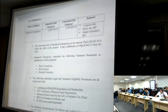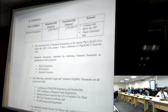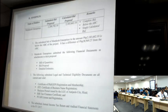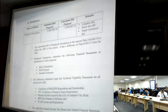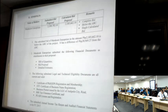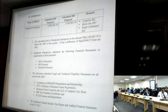During the opening of financial proposal, the bid offer of Marames Enterprises is 2,200,782.10, and this was reduced during the bid evaluation to 2,185,662.10. It was considered as a complete bid. It is below the ABC, and it is the single calculated bid for the project. The amount offered by Marames Enterprises is a difference of 28,969.27 from the ABC. And upon checking the submitted financial documents, it is